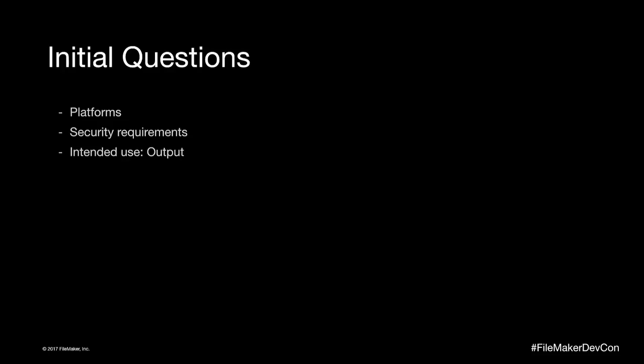Intended use. Output. So is this just going to be a data holder, or are they going to export lists into Excel? That's pretty easy. What if they're going to connect to Tableau? Or what if they're going to have these really complicated subsummary reports? These are the things that you need to know. What do you want to gain from, other than just data entering? What do you want to get out from it? And these are the things you have to know and evaluate in order to figure out how much time it's going to take.